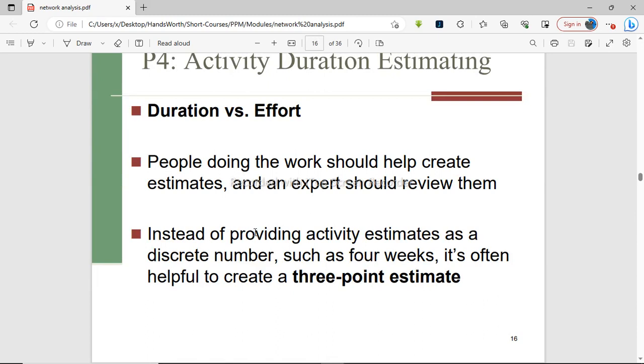That's a 1 point estimate. But if you say this given activity is going to take maybe 1 to 3 days, you can see this activity has been given a range of 1 to 3, which is a 3 point estimate, in which it is expected to be completed.